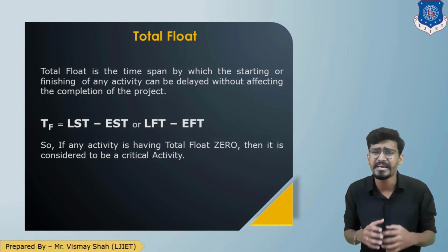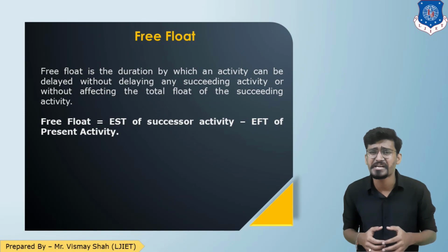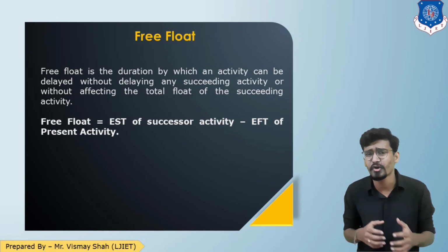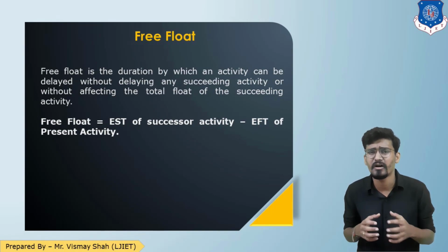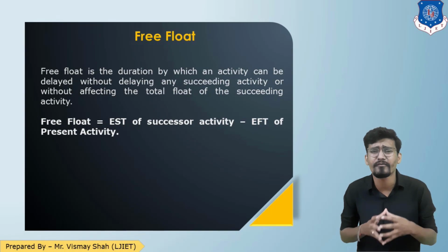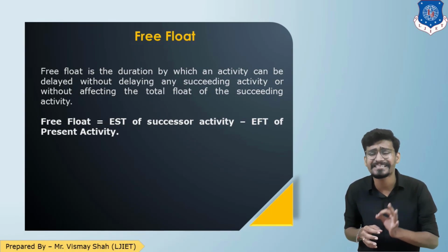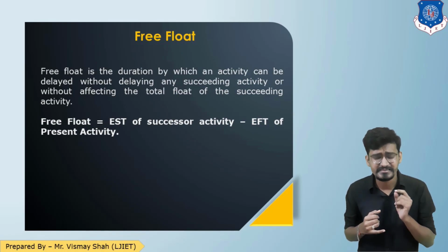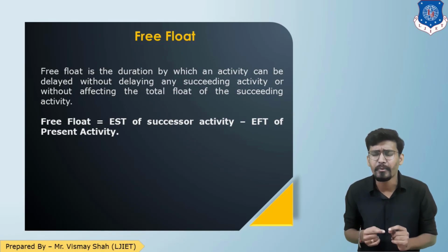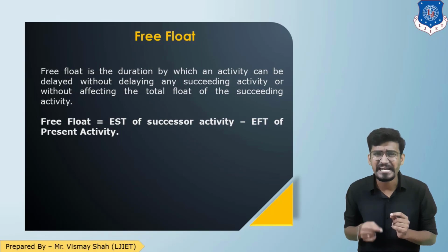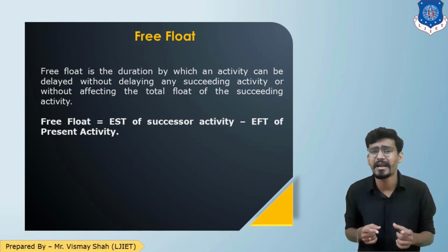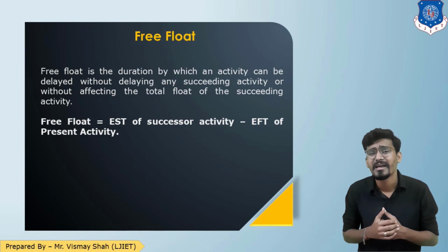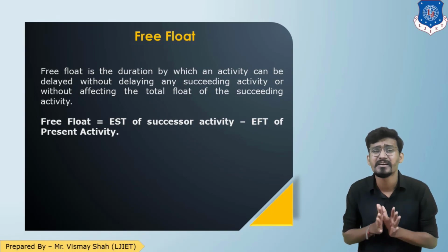Moving ahead with free float. Free float is the duration by which the start or finish of an activity can be delayed or fluctuated without delaying the succeeding activity, or without affecting the total float of the successor activity. Free float is the duration by which an activity can be delayed without affecting the succeeding activity. That value or time is known as free float.